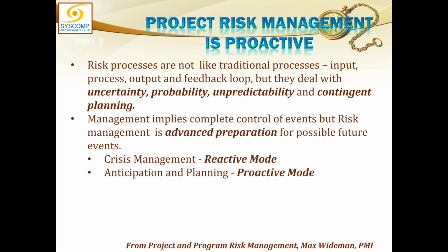I will consider it as a fact, and I will take concrete actions about it in my project management plan. But if I'm 50% sure about something, then probably I will keep some amount in the contingency, or some strategy will be devised that if this risk occurs, or is close to occur, then these steps must be taken.